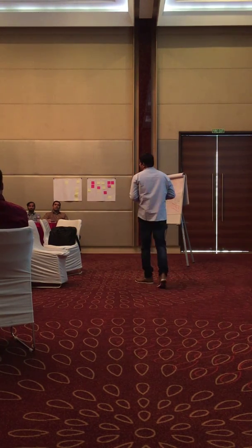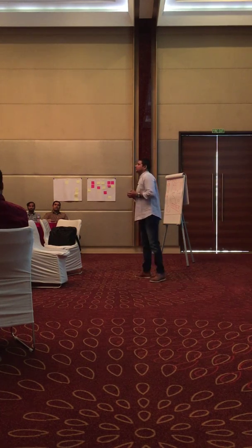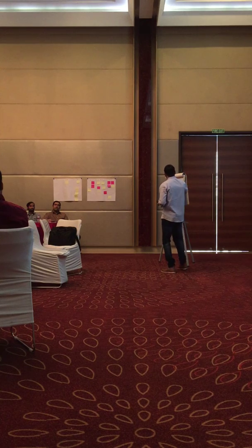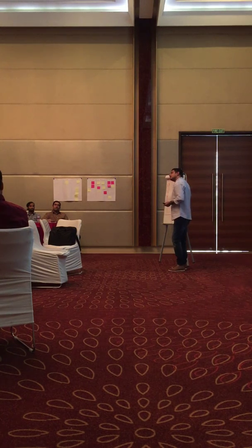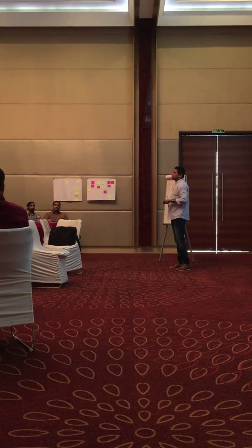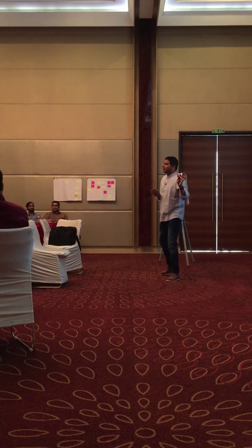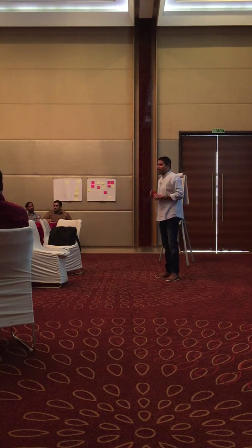Good question. Are we creating the tasks in the backlog? No. The backlog contains only the functional, non-functional items and so on. But when you have the sprint backlog, this will contain the tasks for each story. Because when you start writing all the tasks of your backlog, you wouldn't know which item will be skipped and which item will be implemented, so it is a waste of time. Again, principle number 10. Whatever you are doing, just compare it with the 12 principles and 4 values. Whatever does not make sense, don't do it.